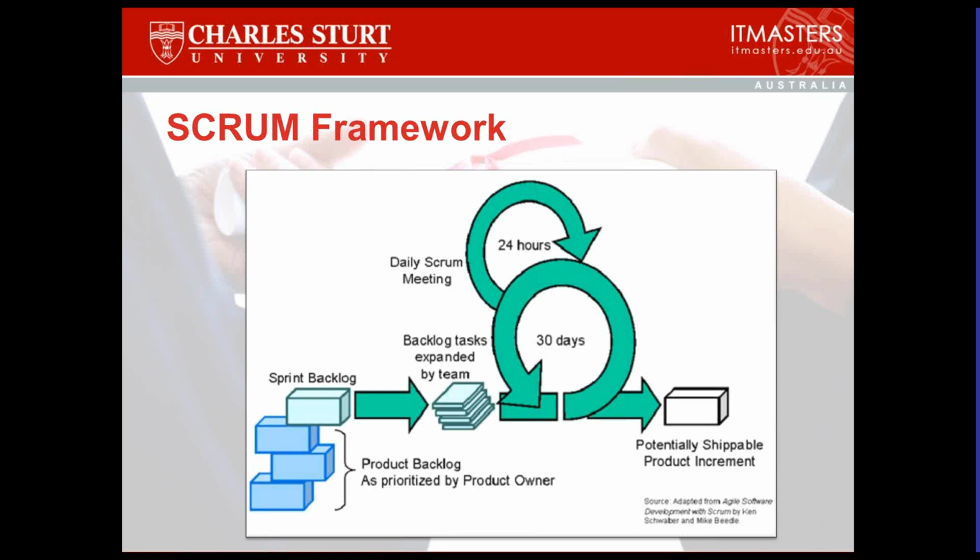Now, admittedly, not every feature is going to be able to be moved out into production. Sometimes some features might work in a standalone situation, but they're still really dependent upon things that are going to happen in the next sprint before they're fully viable. But as a standalone feature, capability, or user story, they are complete and testable and they work. If they're not complete, they don't get included in the review. They go back into the product backlog to get finished in the next sprint, because if they're not complete, we can't assess them. We can't measure them.